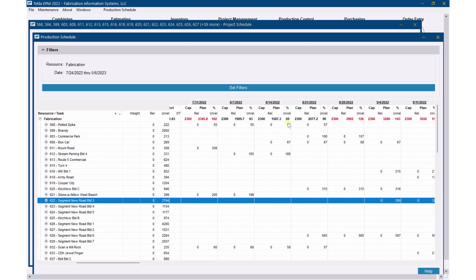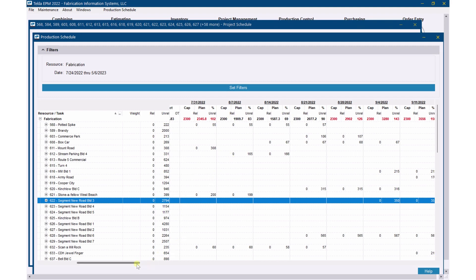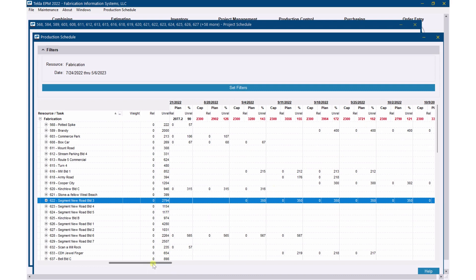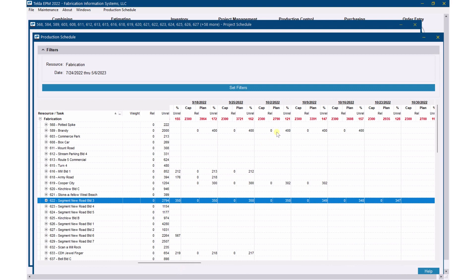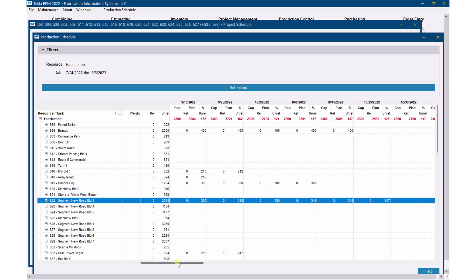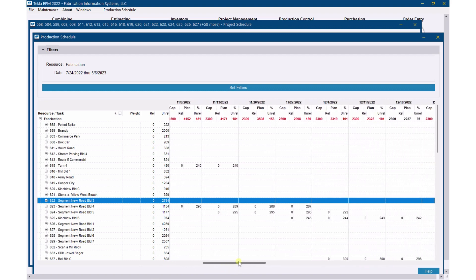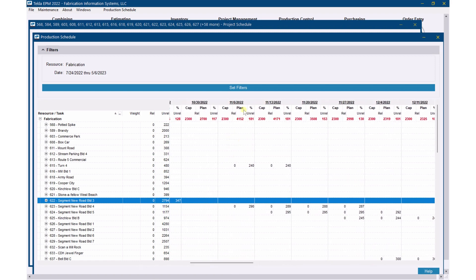Here I'm okay, here I'm okay. Actually I'm a little low here, but I'll probably try to shift some stuff around to fill that gap. Then I start getting where we're going over — 126%, 143%, 155%. I'm really getting into a good bit of overtime in order to make all that work. It starts dipping back down, then 147%, going back up. As we go out into November, I'm really starting to get into some heavy hours — 181% capacity. So I need to look at farming some stuff out in this area or shifting things around to level that out.